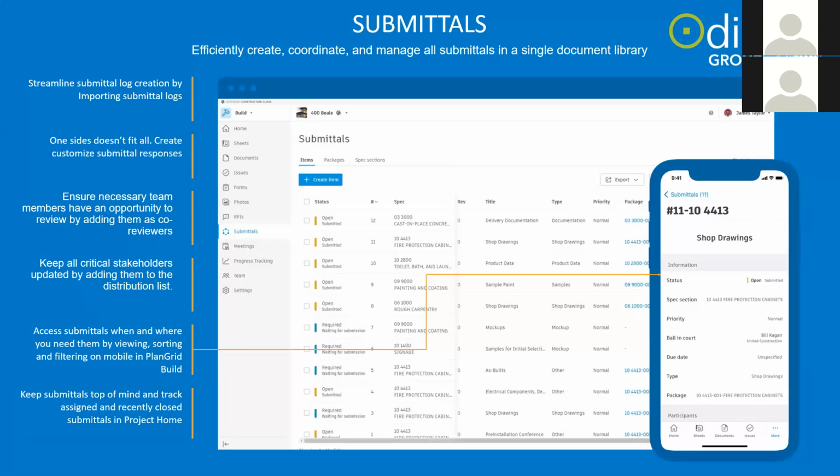That could be a submittal for technical specification of a selected fire damper or air handling unit or wall finish or whatever, and that can be sent as a technical submittal to be approved by the architect or by the fire engineer or the structural engineer, etc., from either the subcontractor or the main contractor as well.